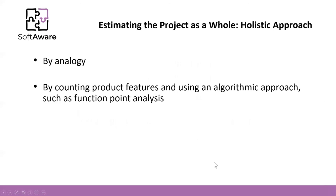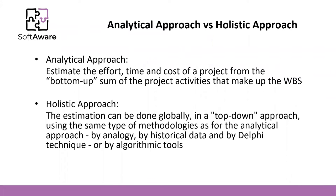So far we have been talking about the analytical approach. We estimate the effort, time and cost of a project from the bottom-up sum of the project activities that make up the WBS. We do a deep dive in the WBS, analyze each part, get the estimation of the effort, then the duration, then the cost. From the duration we build the network activities, define the critical path, and get the duration of the project. From the effort we analyze the cost of each activity, sum the cost of all activities plus the secondary costs, and then we get the cost of the project.